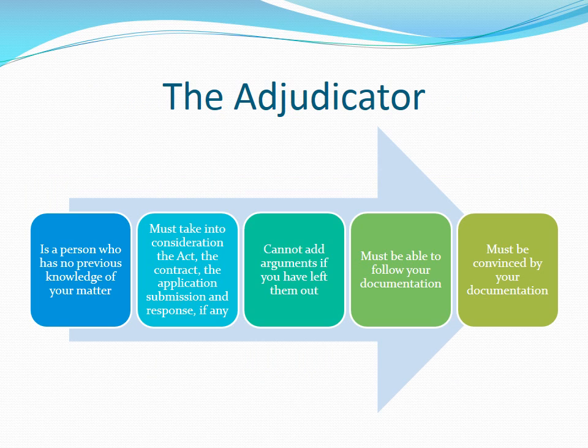In the security of payment process, there are three key players: the applicant, the respondent, and the adjudicator. When you are preparing a submission, you should be focused on the needs of the adjudicator. Unlike the previous two mentioned, the adjudicator has no prior knowledge of the parties, the relationship between the parties, how the parties have acted, or what the parties have said or communicated to each other.